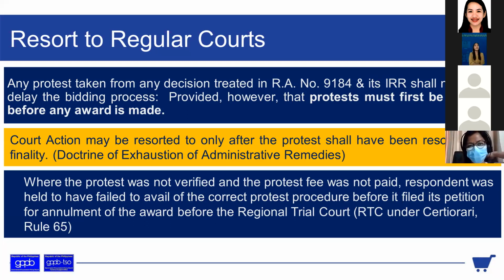So where the protest was not verified and the protest fee was not paid, di ba pwede nyo i-dismiss? Pwede ba siyang mag-proceed to regional trial court for that? Kasi nga na-dismiss na siya. Hindi din. Bakit? Kasi nga dahil nag-fail siya sa protest mechanism, it is considered na hindi niya na-exhaust yung administrative remedies available to him.